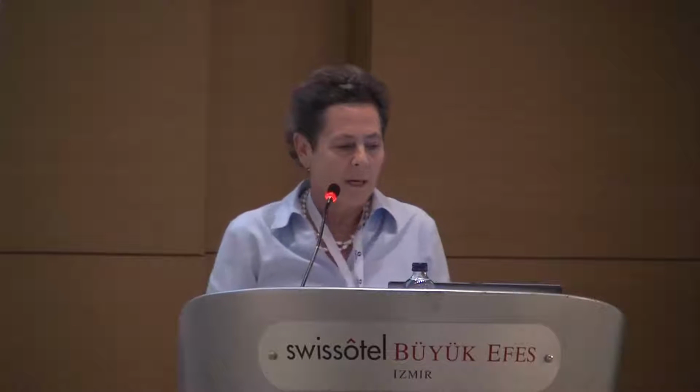So as we move on, similarly, the resource presents risks during the design phase, and then startup and commissioning involving matching the design to the resource. You can't match the resource to the design. The resource is what it is. It's set by Mother Nature. We can't change it. So the one thing you can change is the design of the project, not just the power plant, but the gathering system. And so that's where to make the change, not the other way around.